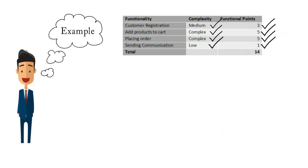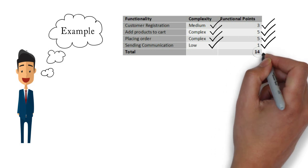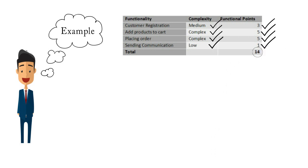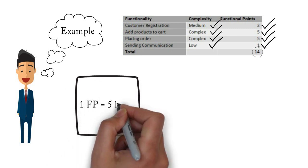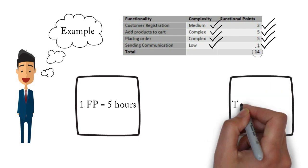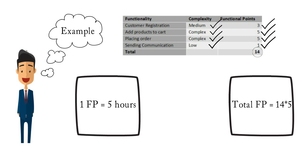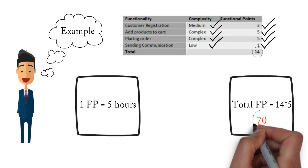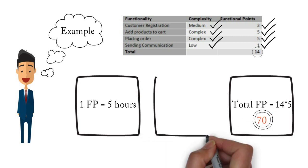The next step is to find out the total functional points for all the functionalities. If we sum up the values for all functionalities, we get a final value of 14. Now we need to derive the time to complete one functional point — in this case we are taking it as 5 hours, which means a person requires 5 hours to complete one functional point of effort.